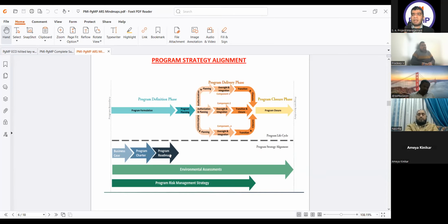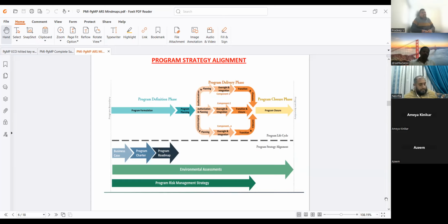Updates here doesn't mean that you have to make some change or you have to approve some change. But if you feel that during the tenure of the program, something is getting conflict or something is not going as per the expectation, the first step is the program manager will update that specific document as per the current information based on the current status, and then he will analyze whether he needs to escalate it or not. Is this concept clear? This is the responsibility of the program manager. Any question till now?